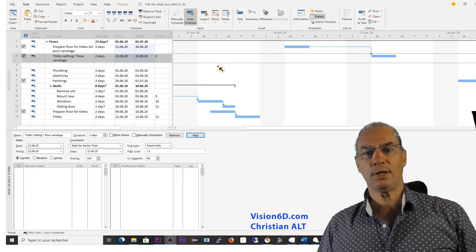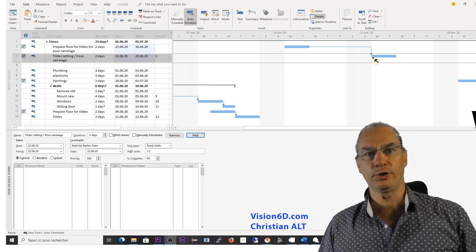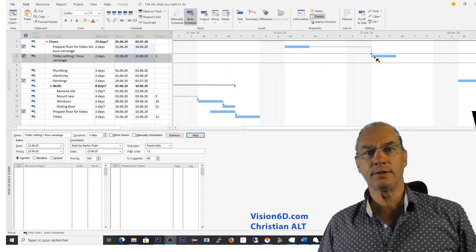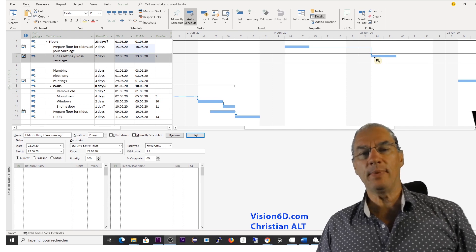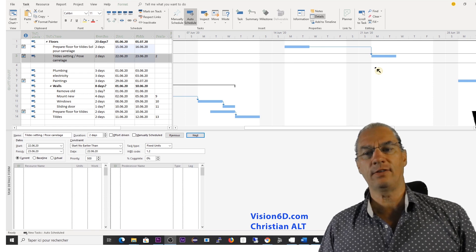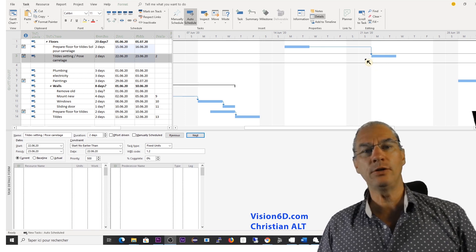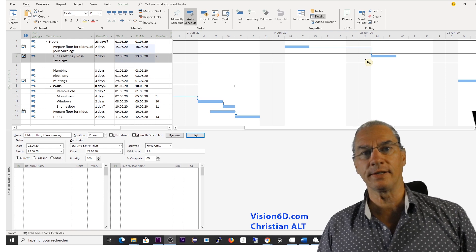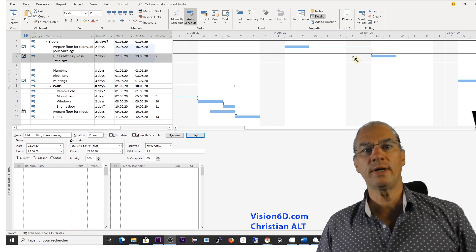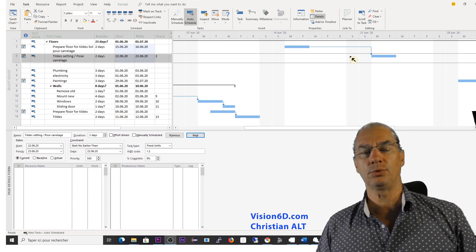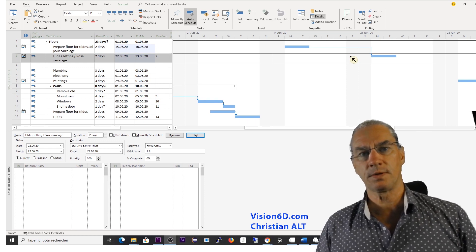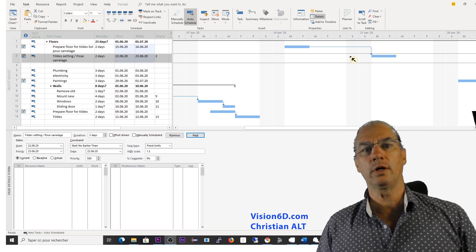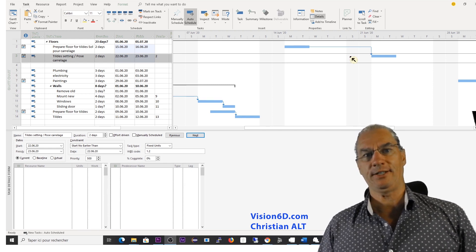I could also have solved this in another way by setting for the tile setting date when it has to start. But by doing that, we lose the dynamic that we have in our plan. And you never know if you have to re-plan something. So it's always better, but more difficult to understand when you are using constraints. You are keeping more of the dynamic into your plan.